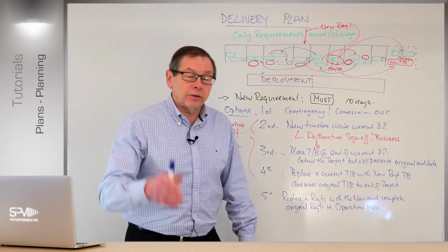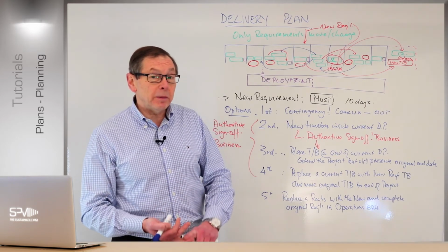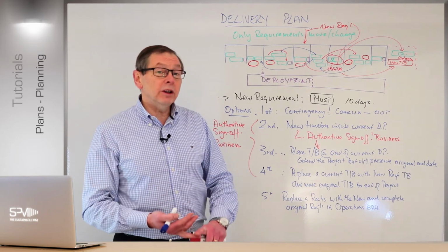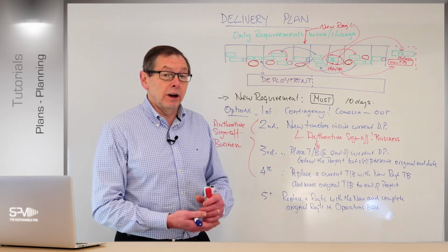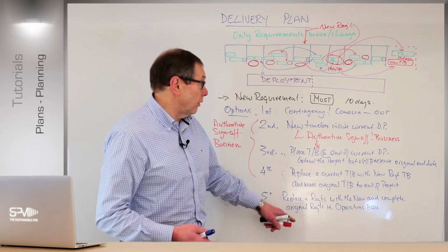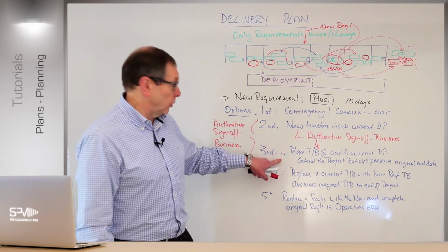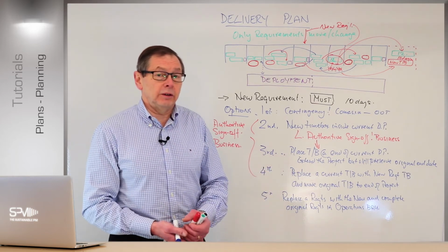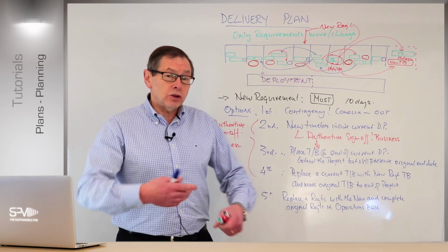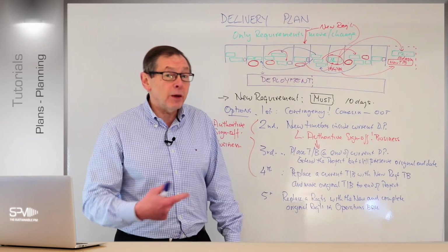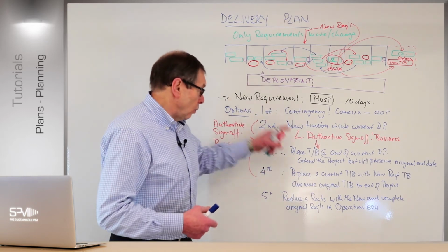But the key thing here to work out, first of all, is one, it's got to have authority sign off. Go a step at a time is the other. One thing at a time, make the recommendation so they can make an informed decision about which one fits, right? So you might have to jump to one of these already. So you say, well, we can't do that already. We really need to offer option 3 or 4 because of certain circumstances, right? But as long as they know what's happened before and why you can't do the other one. So make sure the business understand this, because at the end of the day, it's their project, remember. So they need to sign that off. So just bear that in mind, work that out.